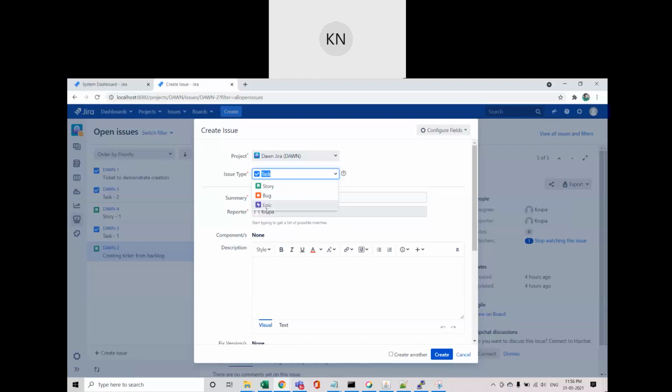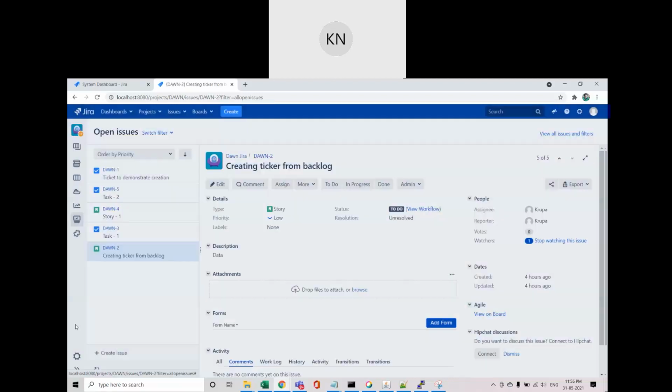In order to get the issue type schemas, or see what different kinds of issue types are associated with your project, you should have the Jira admin permission. Once you have Jira administrator level access, you can go to your project settings or to the global settings, I mean the administration. Anyway, the project administrator, not a Jira administrator, will also have the project settings available, and can see what issue types are associated with that project.